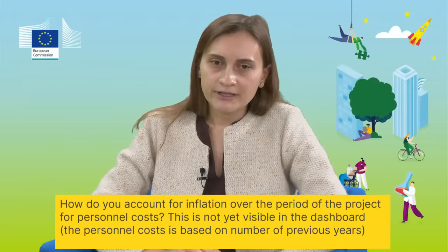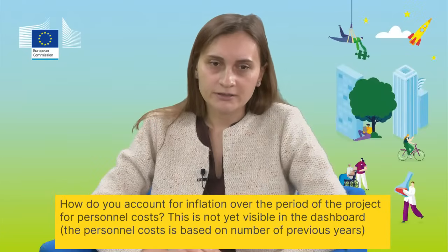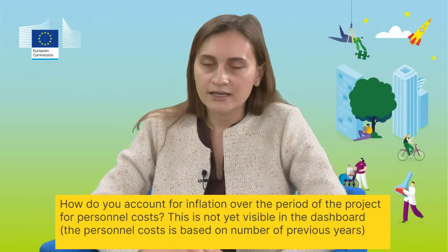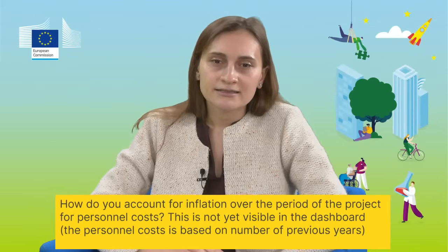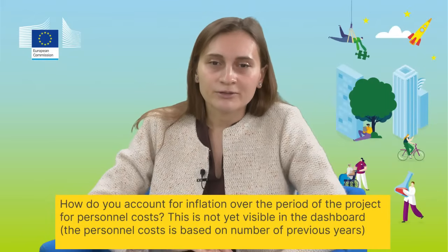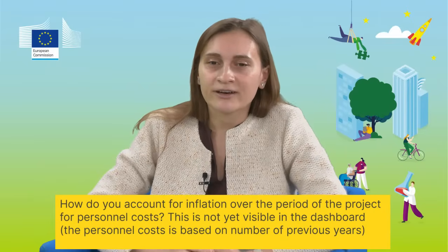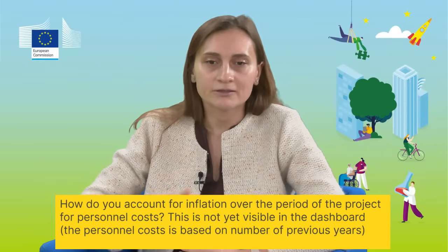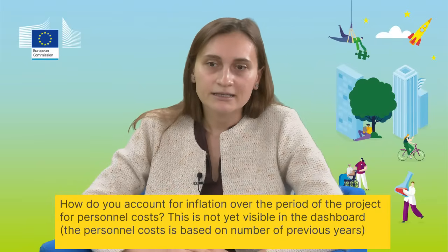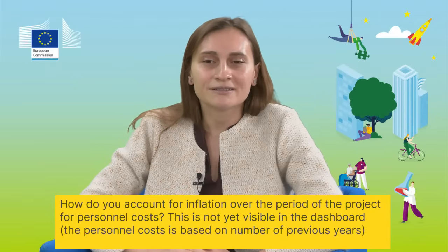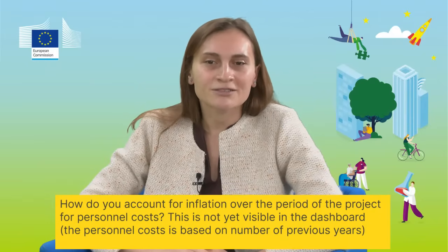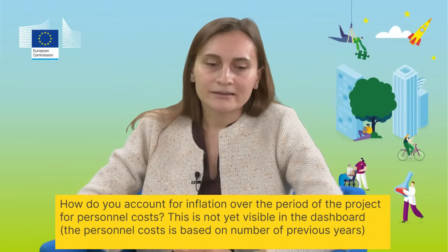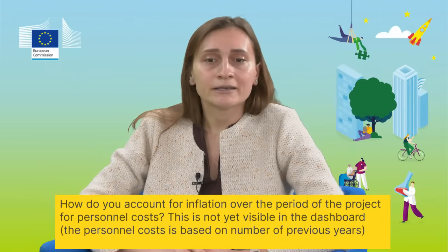How do you account for inflation over the period of the project for personnel costs? This is not yet visible in the dashboard. The personnel costs are based on a number of previous years. So the way to account for it is to justify and explain that you have maybe higher costs because you expect inflation and you take this into account. I think the key here is to really provide a justification for your costs, so that it is also assessed in the correct way by the experts as well.